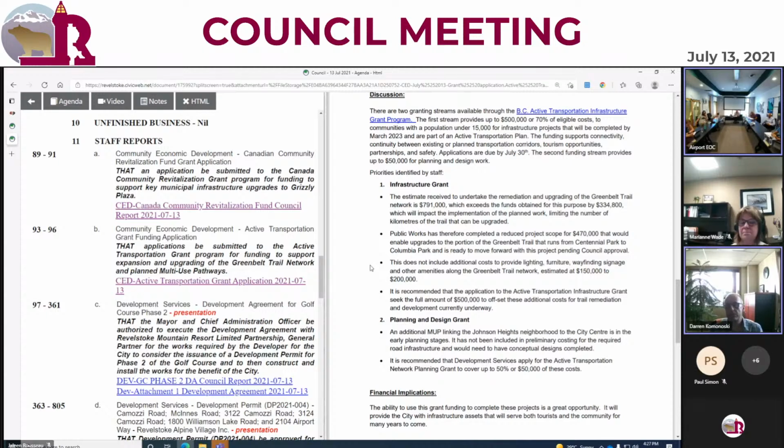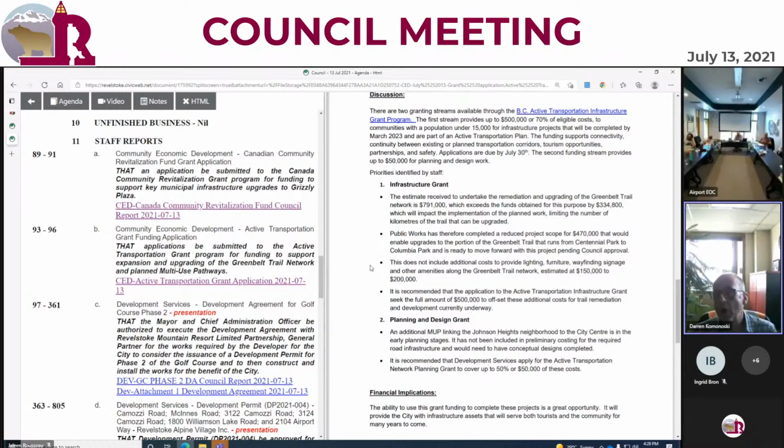Your Worship, we will be getting into the engineering part. A lot of it is reconstruction, doing some of the sub base, and as well doing root barrier, running it laterally to where the trees are heavier to prevent roots from coming into the asphalt surface. Especially from Centennial Park into Columbia Park, a lot of that will be reconstruction. From Centennial Park to Sulz River, it's more just overlay. A lot of that asphalt is at a state where it needs to be overlaid. If you don't overlay it, you'll be looking at doing a whole new surface. Okay, thanks for your question, Councillor.